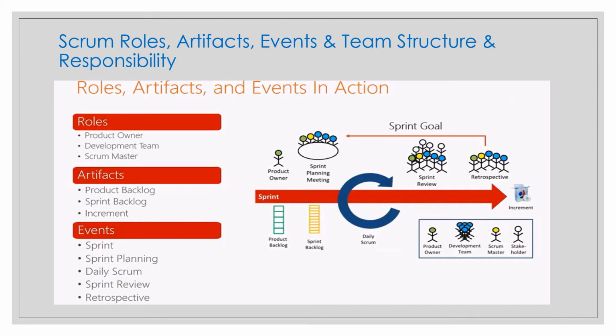It is more like a demo. So it's a working session and interaction with them. And the sprint review is the second last event of the sprint and is time boxed to a maximum of 4 hours for a 1 month sprint. For a shorter sprint, the event is usually shorter.